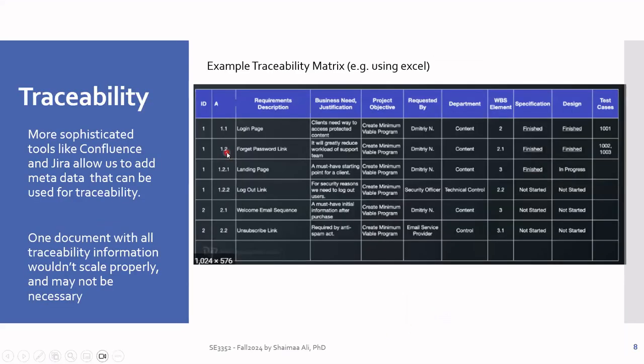Now there is the concept of traceability. Traceability is just to make sure that as we go throughout the development process, we can trace the activities back to the requirements. Now, the requirements, we're going to start to make more specific requirements, so it would be good to start giving them numbers, like numbering.